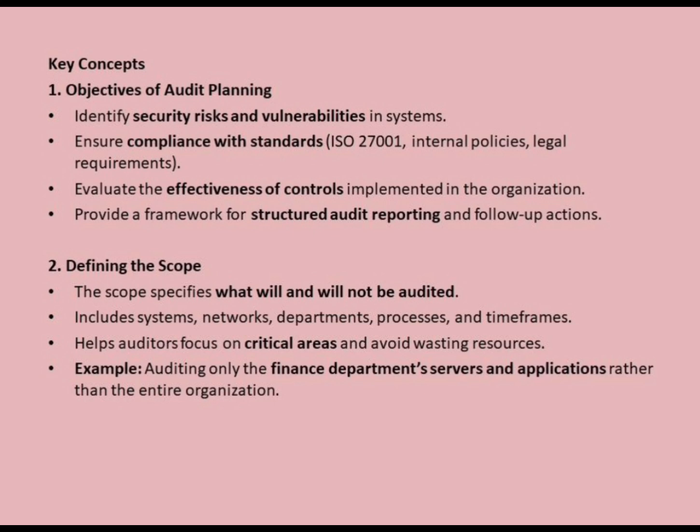Example: if an organization wants to audit its finance department, the scope may include the payroll servers, accounting software, and related access controls, but exclude unrelated departments such as marketing or HR. By limiting the scope, auditors can spend more time analyzing key systems and produce more accurate, actionable findings.